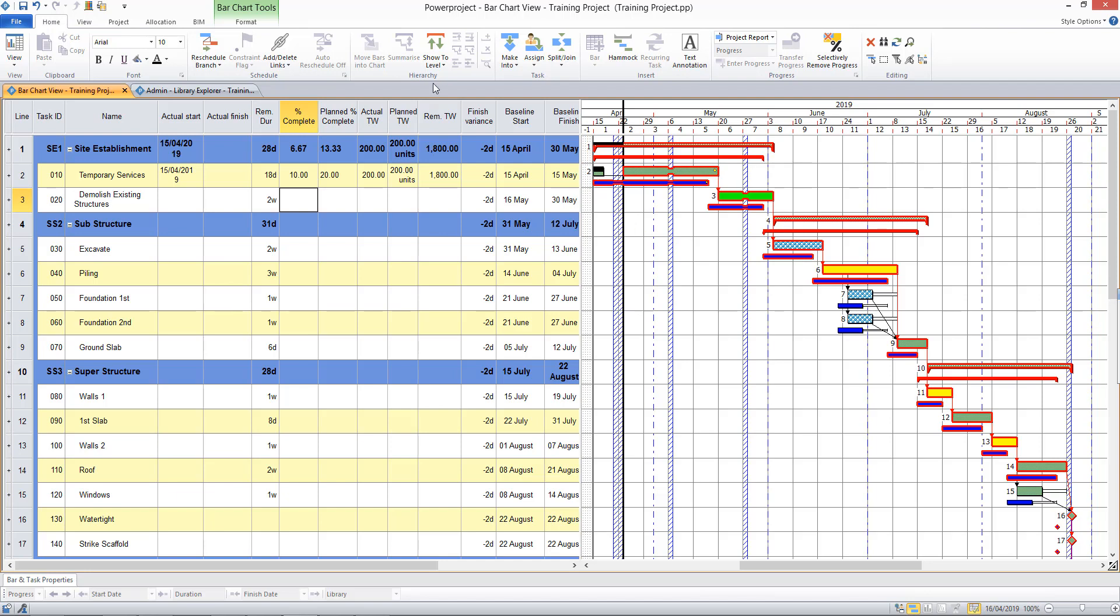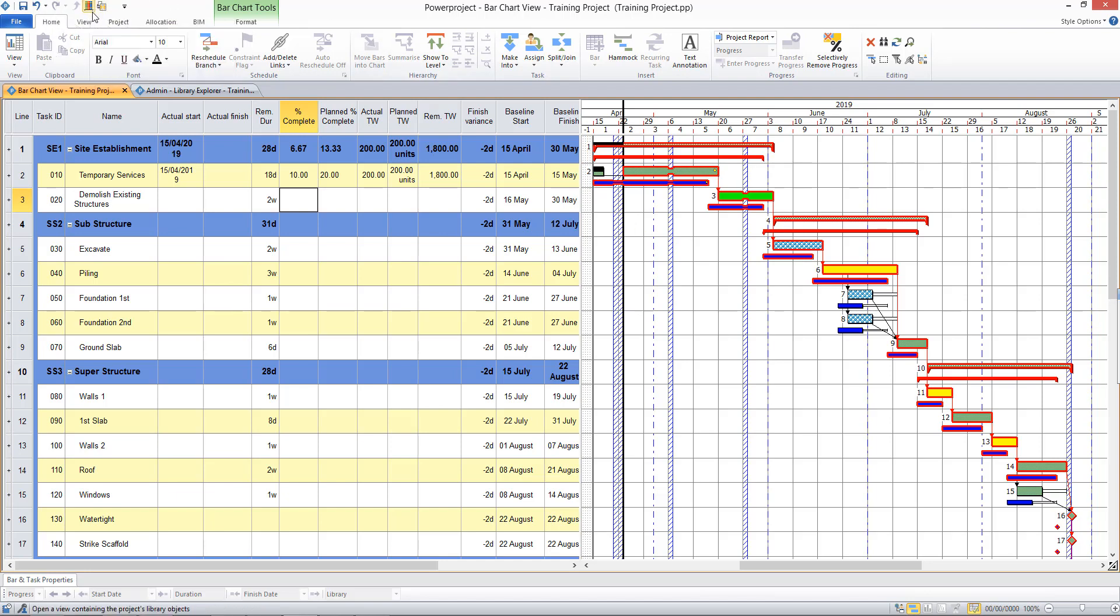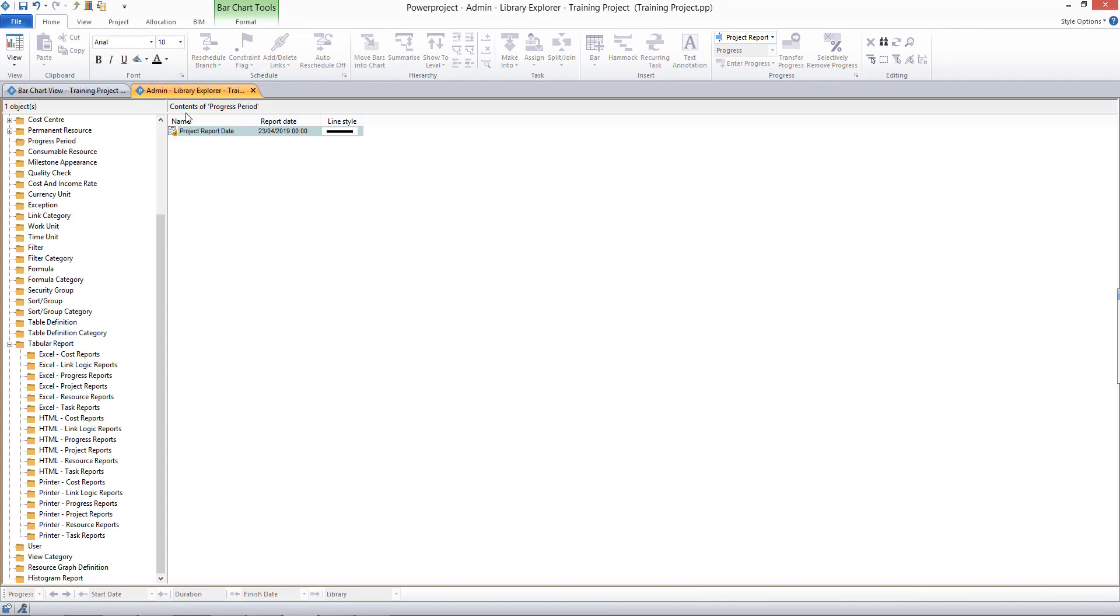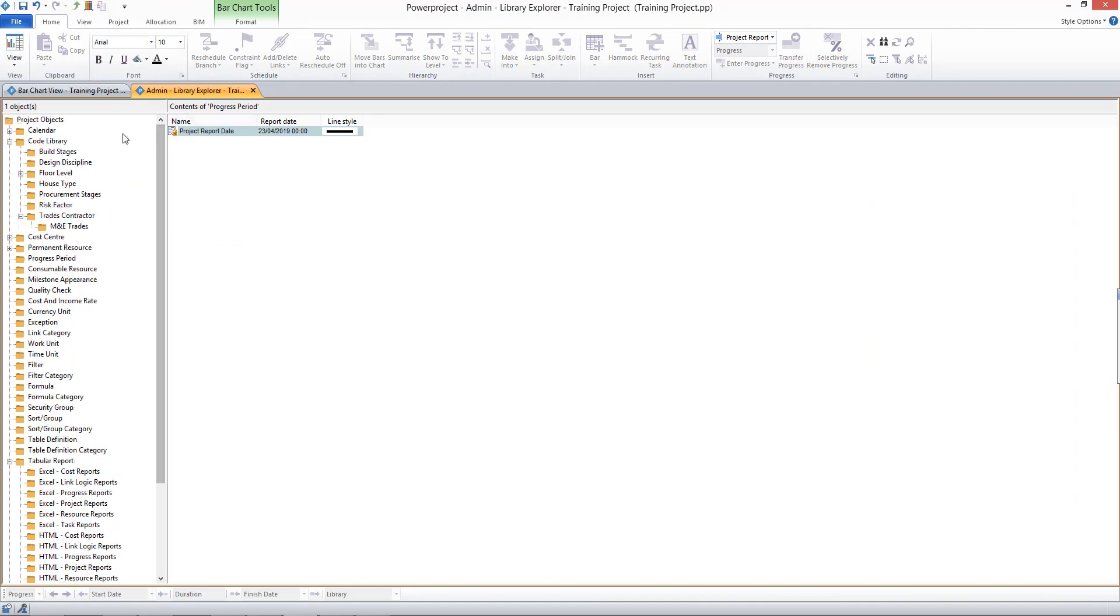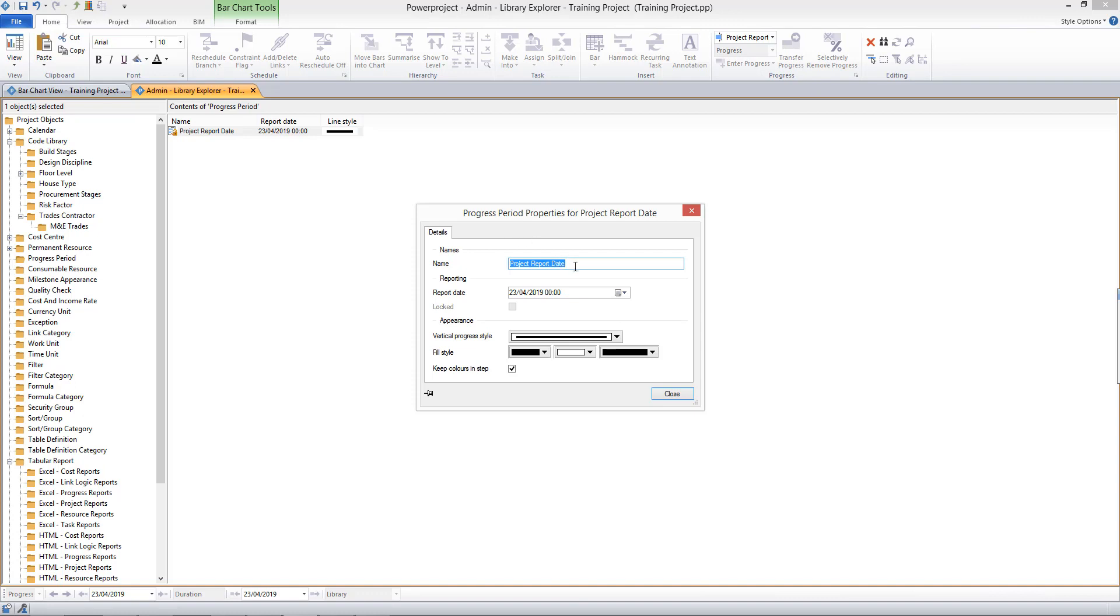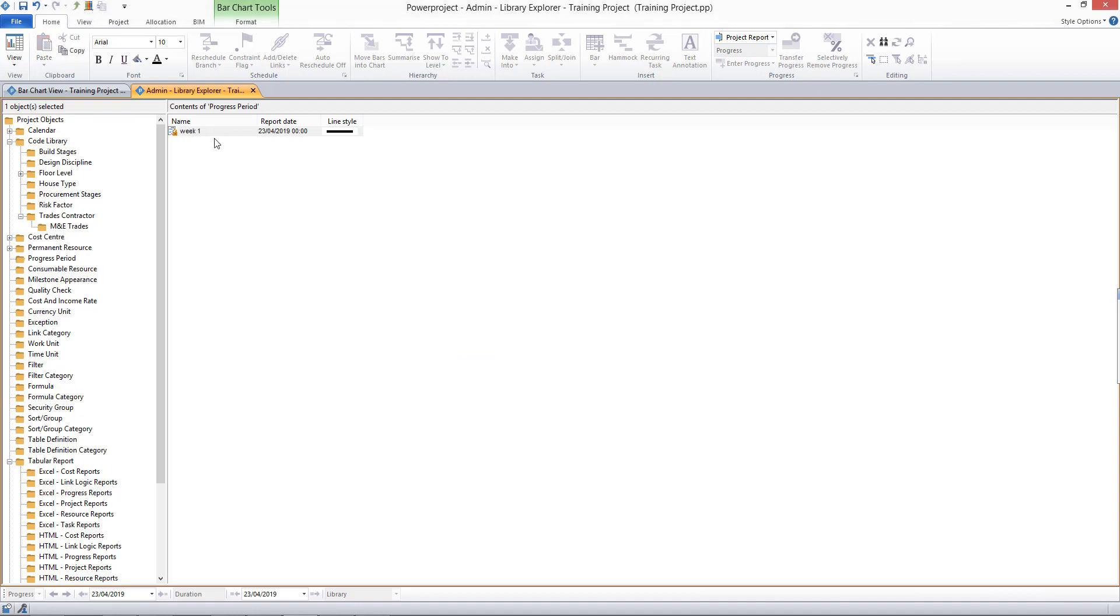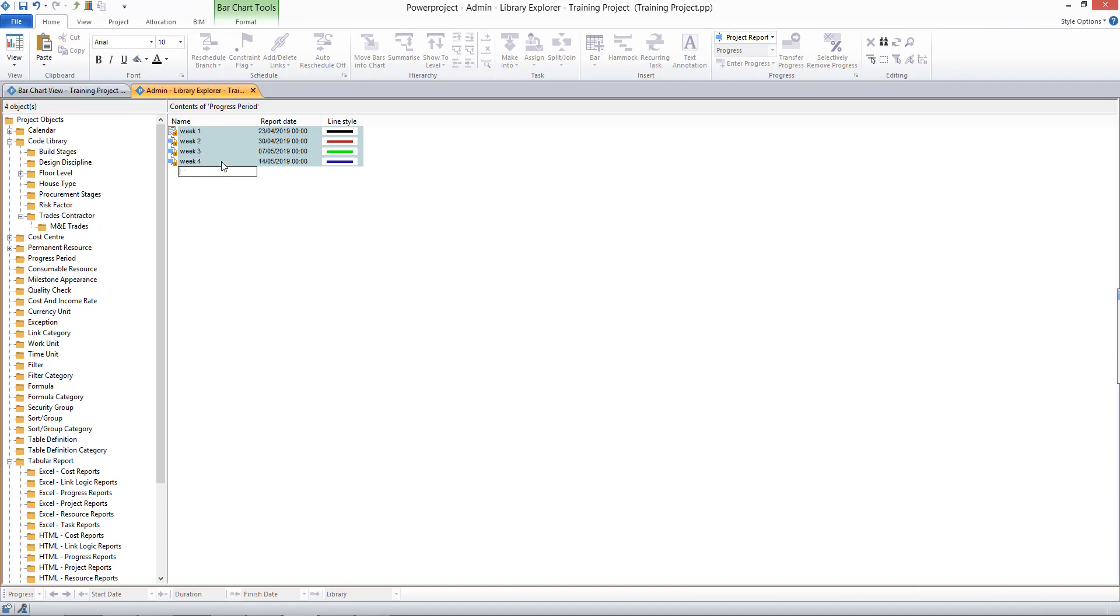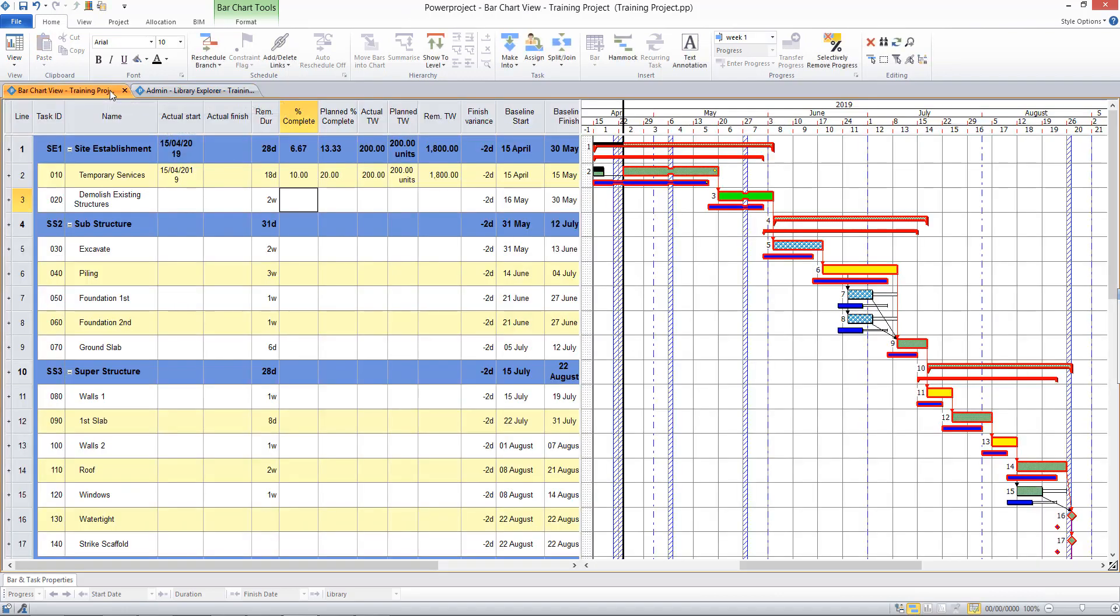So I can create additional progress periods by clicking on my Library Explorer button and navigating to the Progress Period folder in my library, and this displays the current progress report date that we have. I can call this Week 1, and I might then continue to create further weekly progress periods. Week 2, Week 3, Week 4, etc.